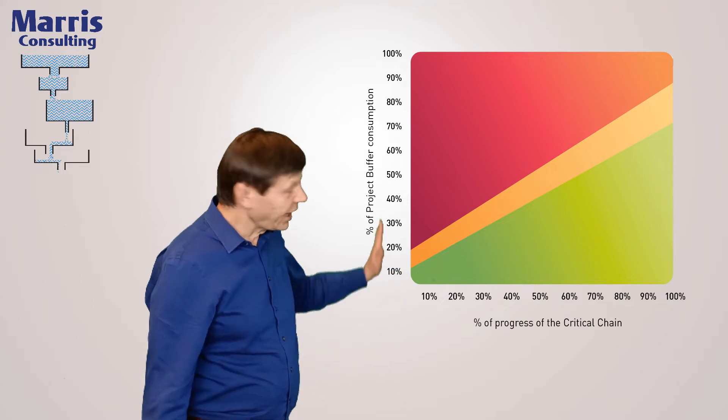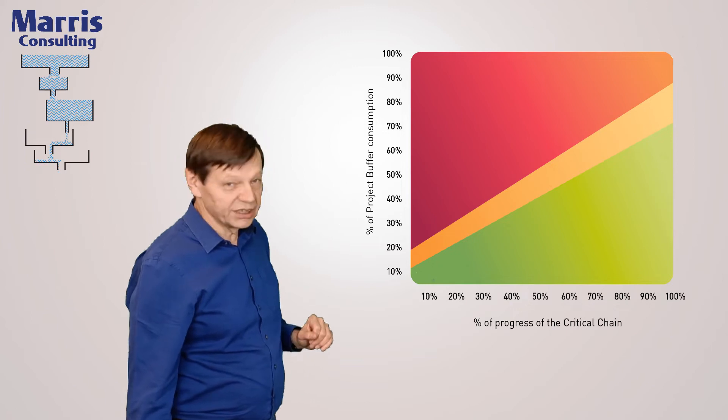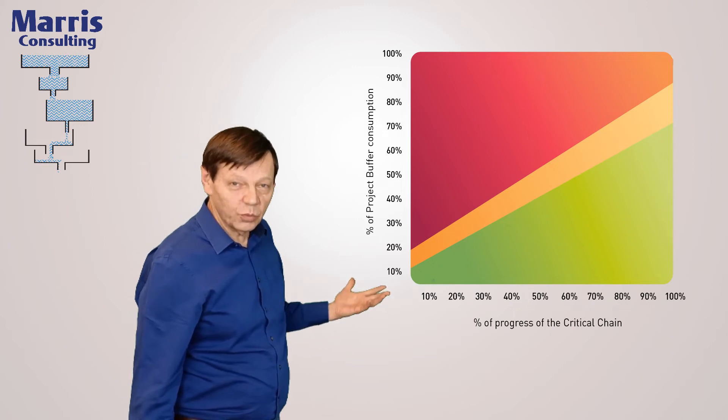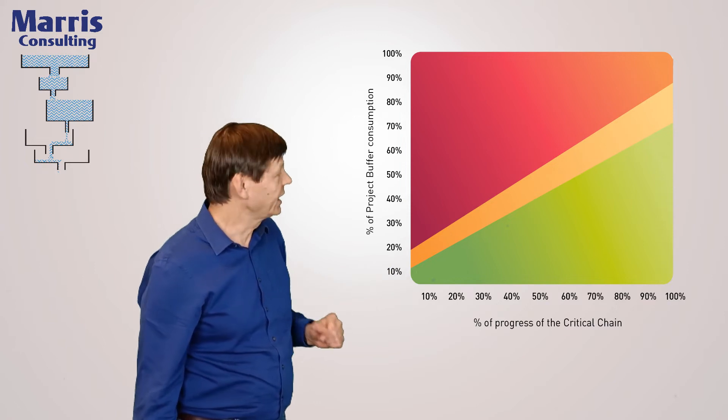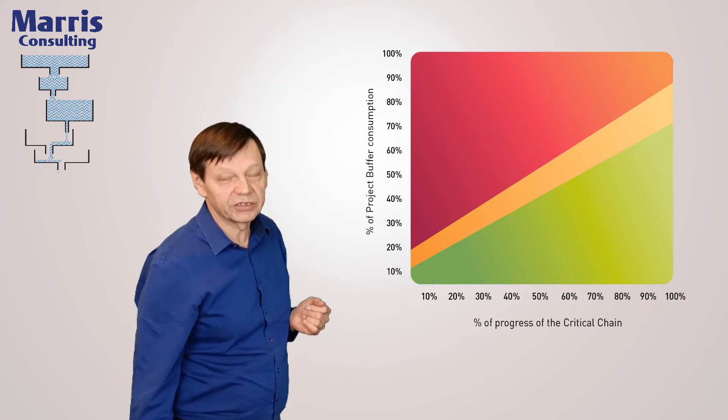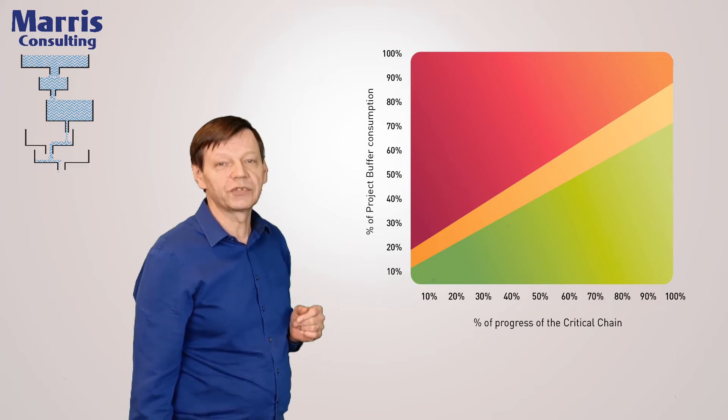So there is the other axis, the buffer, which is there to absorb the fact that we're going to go slower than the optimistic durations. It is big, that's to say that it's approximately one-third of the overall duration.